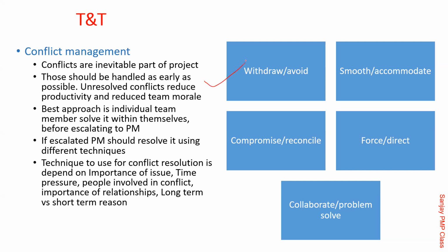A withdraw or avoid type of project manager, the person who is using the conflict management style called withdraw or avoid, what will he say? I am very busy, next Friday there is a board meeting. I'm preparing for that. Can you please handle this yourself? This is called withdraw or avoid. He's not participating in it. Is that a good style? Probably no, but sometimes some people use it.